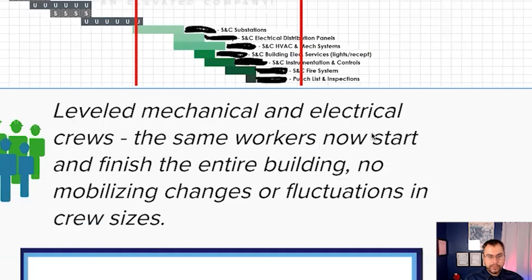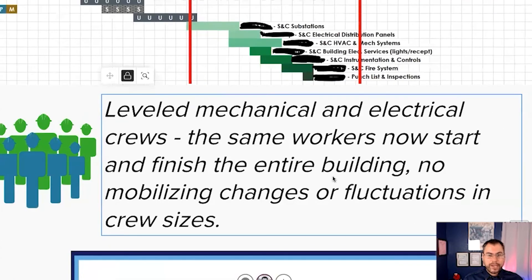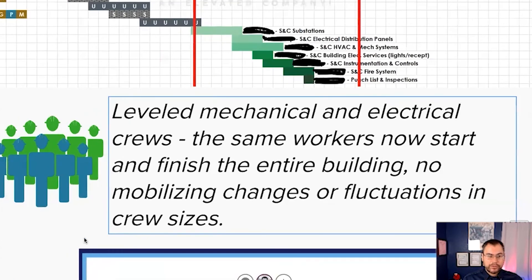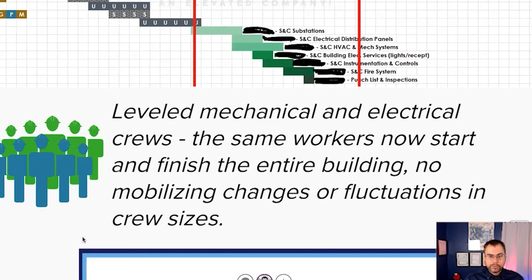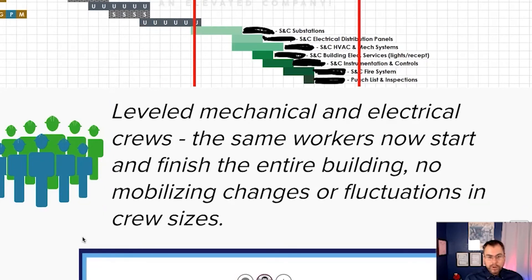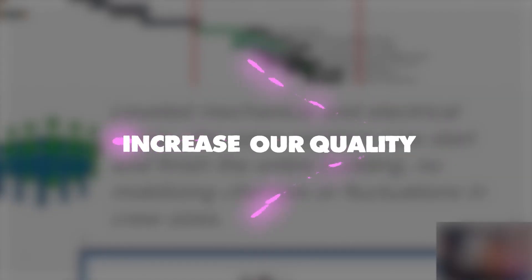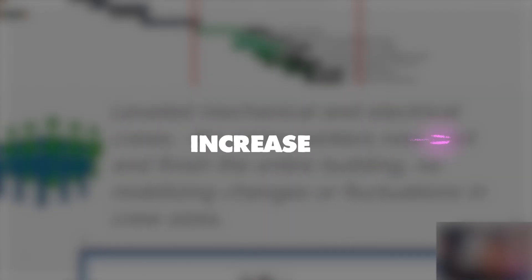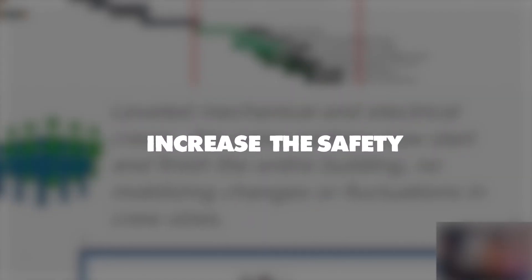One very cool thing that came out, both the mechanical and electrical trade partners said, you've leveled the work for us. So now we'll have the same crew starting and finishing the entire building, no mobilizing changes or fluctuations in crew size. We know based on experience that doing this is going to allow us to increase our quality and increase the safety for everybody.